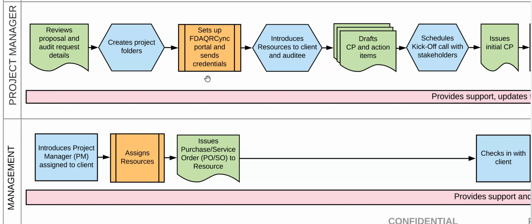Once the portal has been created, the PM would send out a welcome email with instructions to the resources as well as the client and any other parties that would be involved with document sharing for the project. The project manager is also responsible for introducing the resource to the client and/or auditee. Next, the PM would draft the collaboration plan and any necessary action items and send out to the resource and